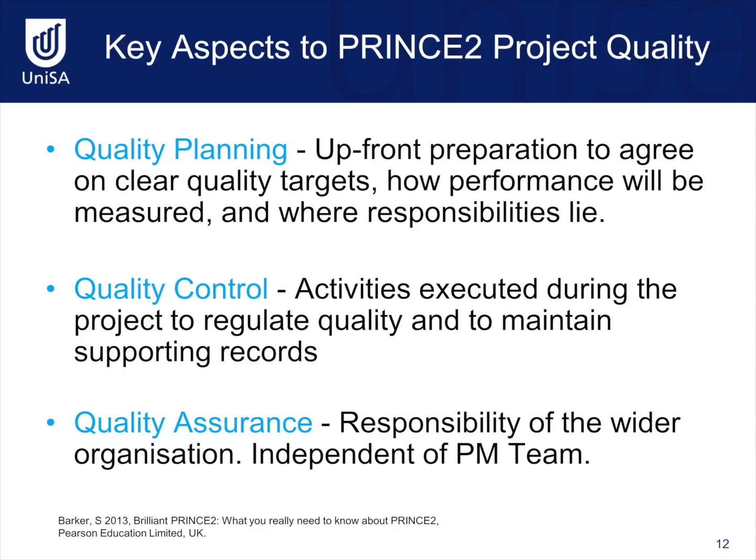Quality planning requires some upfront preparation. We need to make some decisions at the beginning of a project to agree on quality targets, how performance will be measured, and who is responsible for producing, testing, and verifying that products are fit for purpose and have met the quality criteria that have been specified by the customer.